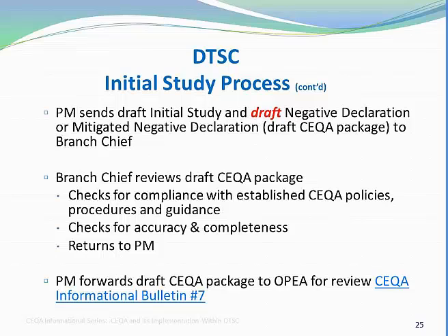We request that at least 15 days be allowed for OPIA's review. Sometimes revisions to the initial study or additional follow-up activities with responsible or trustee agencies may be needed. Because of the possible need for follow-up, please allow extra time in the project schedule for revisions and reviews.